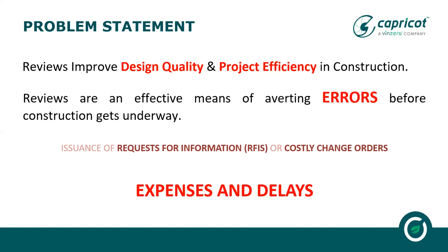So we need to be sure that the drawing file which has reached the construction site, which has to be used for the execution of the project, needs to be reviewed and approved by the different team members. Then only it should be used for the execution. Otherwise, it can lead to expenses and delays.